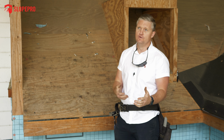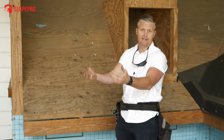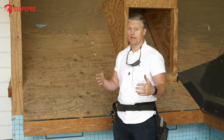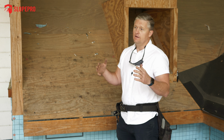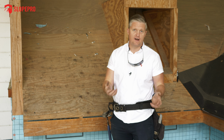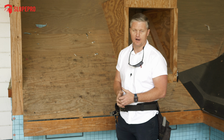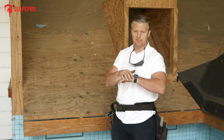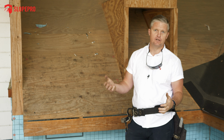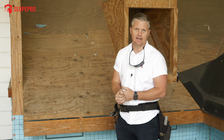If we don't use all of the wood replacement that we've included in your estimate, obviously we will credit that right back to you. You will notice in the estimate that you do have what we call change order language in there. So even if we account for some wood, but we do find some other sections, we would just change order that based on the pricing in the contract. That is standard operating procedure in the roofing industry, because obviously there's no way to know in any scenario some of the areas that can be damaged.